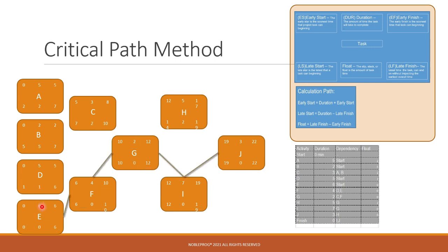To understand this further, what we've been able to determine is that the latest finish is 22 minutes. The earliest finish would need to follow this path to have a late and early finish. The last component to determine is called our free float. This is the maximum number that an activity can be delayed without delaying any succeeding activity. Once the floats are calculated, the string of critical activities will be identified. This continuing string of critical activities is called the critical path.